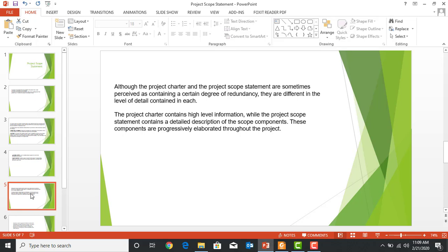If you have seen my previous video that explains what a project charter is, you would know that the project charter only contains high level information and we should never change a project charter. A project scope statement, although a separate statement, has a high level of detail. And as we get more information in our project, we can add that information to our scope statement. So we keep working on our scope statement as we get more information. This is known as progressively elaborating the statement.